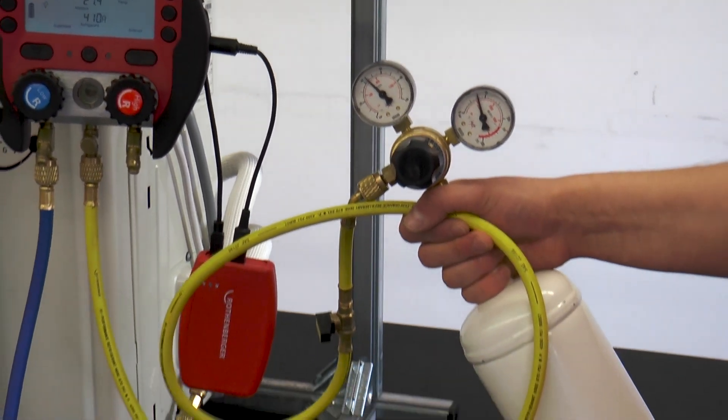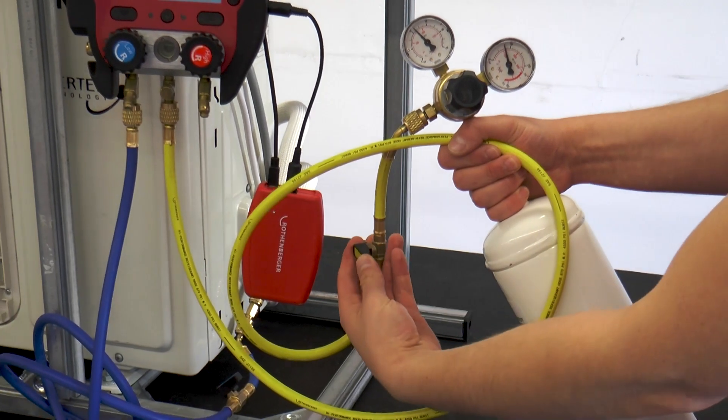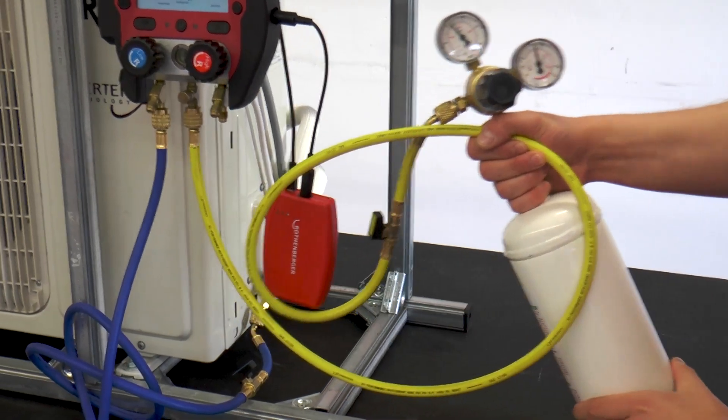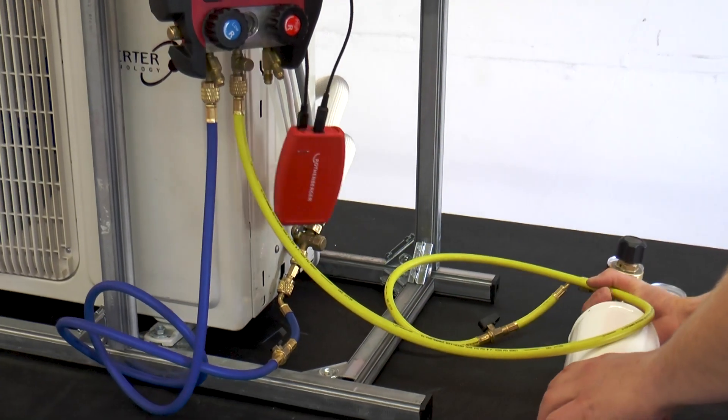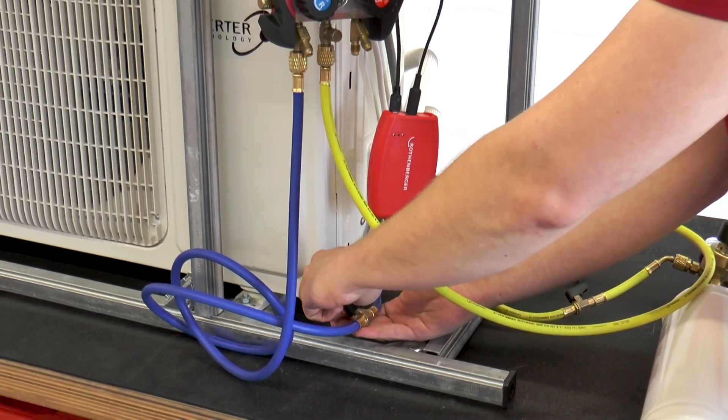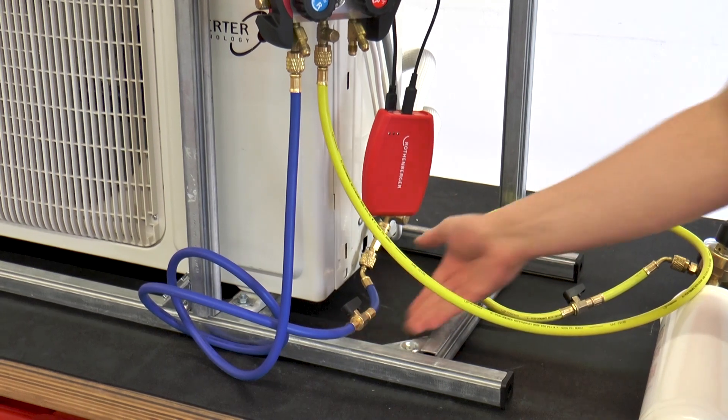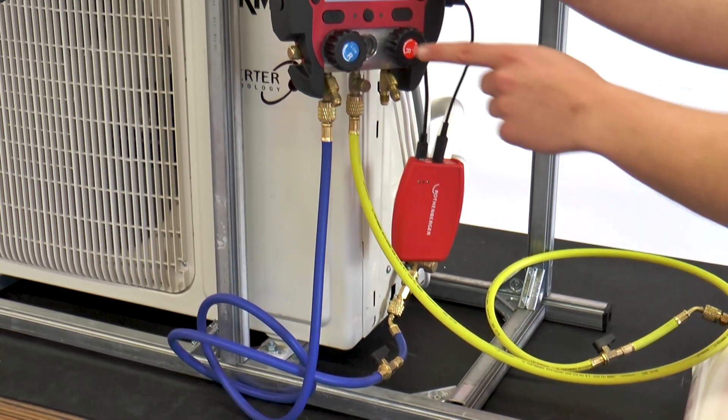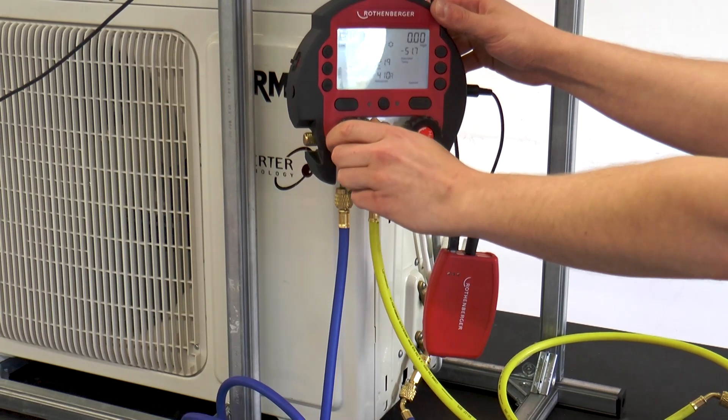Next, the shutoff valve on the working hose is open. The shutoff valve on our blue test and measuring hose is then open. Now the dry nitrogen can flow into the air conditioning system in a controlled way via the yellow working hose and the working valve.